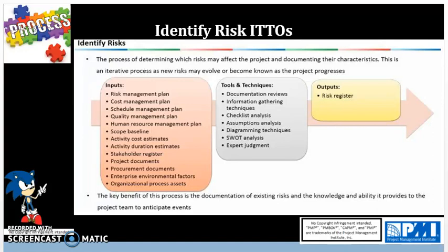Next, for tools, we have documentation reviews. This is the process of gathering a group of information and reviewing it to determine the accuracy and completeness of the information, and to see if there are any risks within the documentation themselves. Then you have information gathering techniques. This includes brainstorming, which is an unfiltered gathering of ideas.